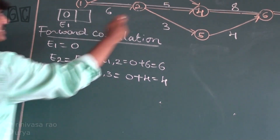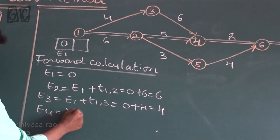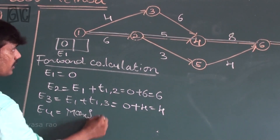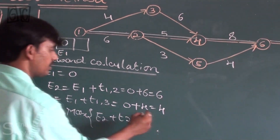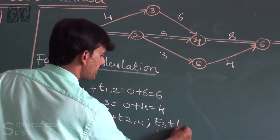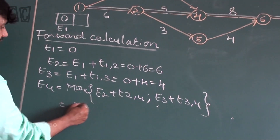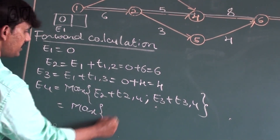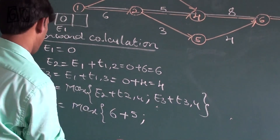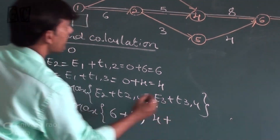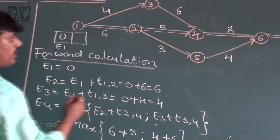Now E4: E4 is coming from nodes 3 and 2, so we take the maximum of E2 plus time taken from 2 to 4, and E3 plus time taken from 3 to 4, which equals maximum of (6+5) and (4+6), giving E4 equal to 11.